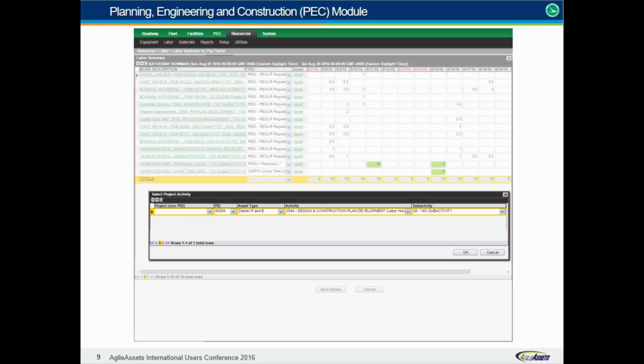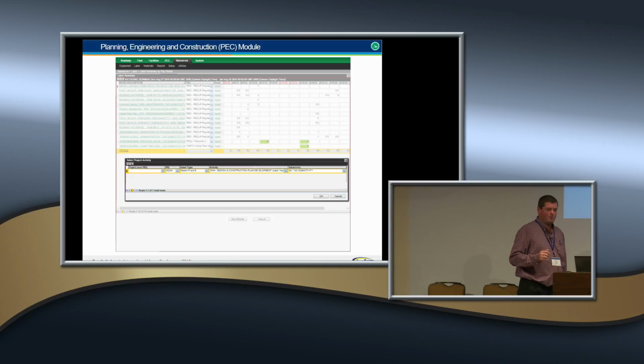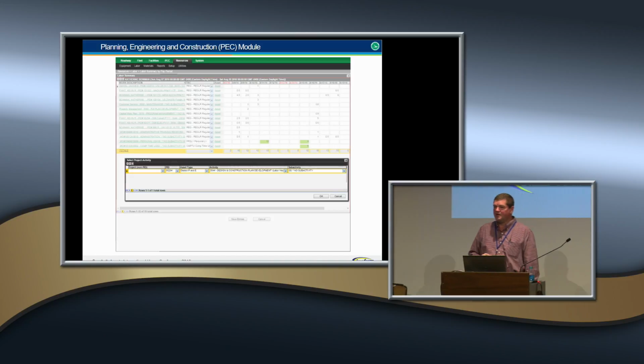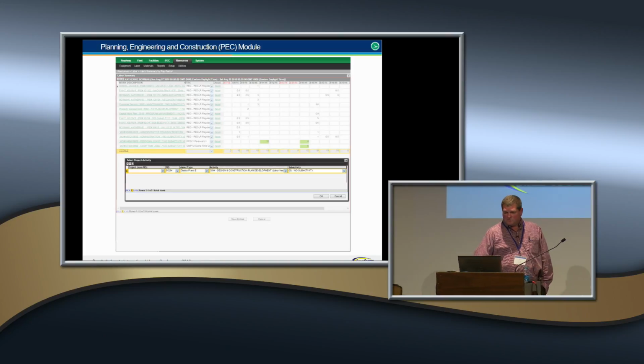So you're looking at the description that's on the left there, which includes a couple of very specific things. The very first thing on a project that you'll see, if it's a PID project, is the project manager's name. That is the person who's ultimately going to be responsible for approving all of the labor that gets charged to that project. We do not have our immediate supervisors approving time on our actual federal projects. We have the project manager do it, or a project engineer, someone who has oversight of that project as a whole. They should be responsible and understand who's charging what to their jobs and really have a good handle on it.